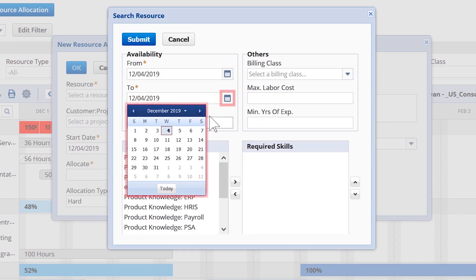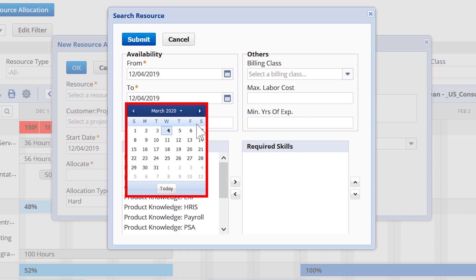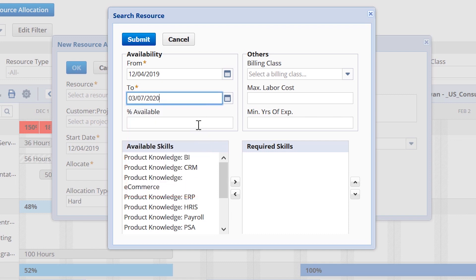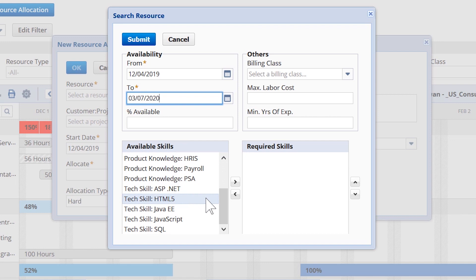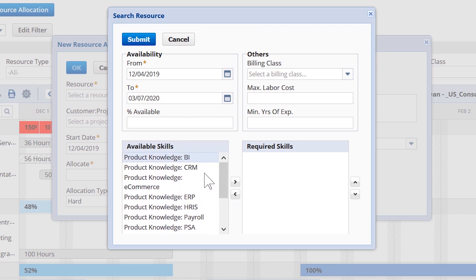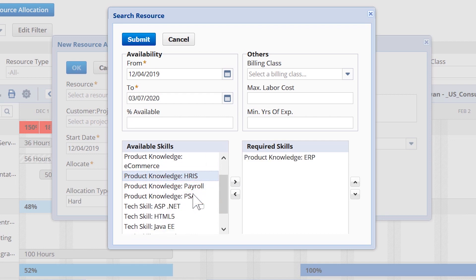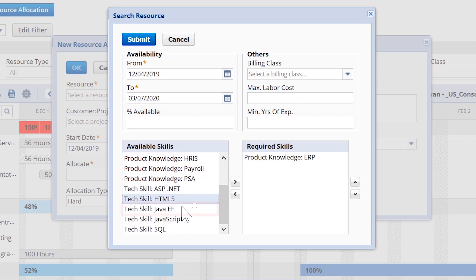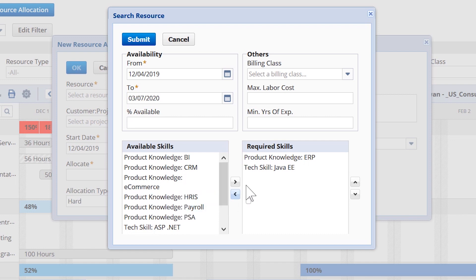Here I will choose the date range of the project. I have a list of the available skills of my entire resource pool, which lets me staff resources to projects based upon their skills, specialties, and areas of expertise. I will choose the knowledge and skills required and choose the billing class of the resource we need to assign for this project.